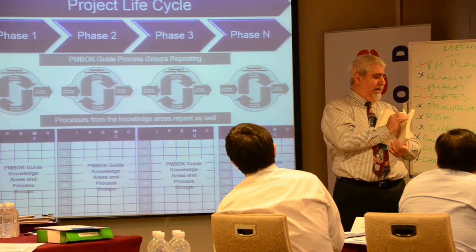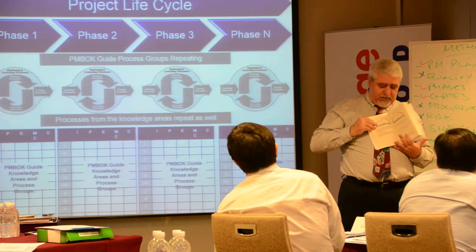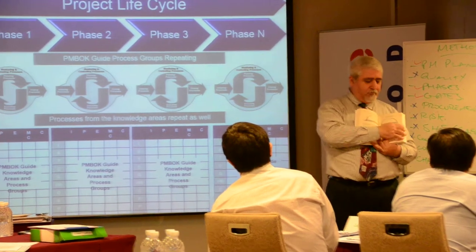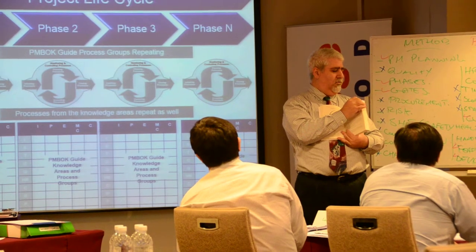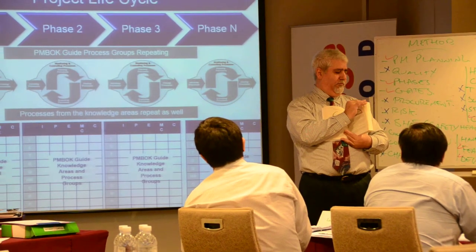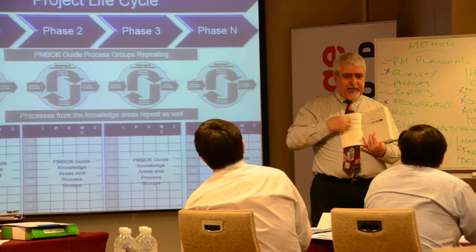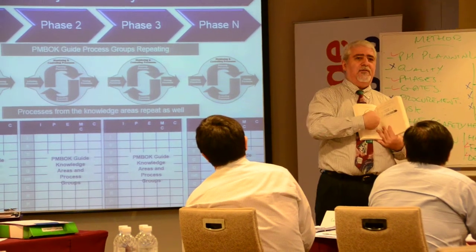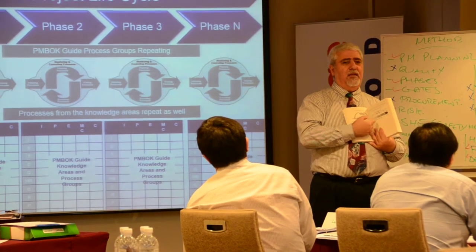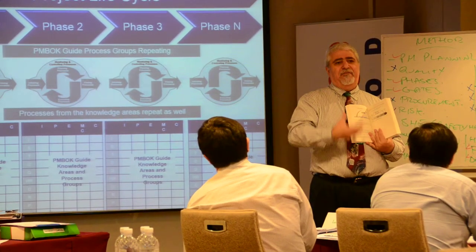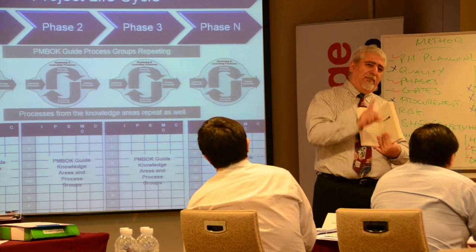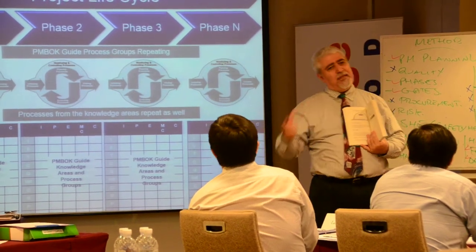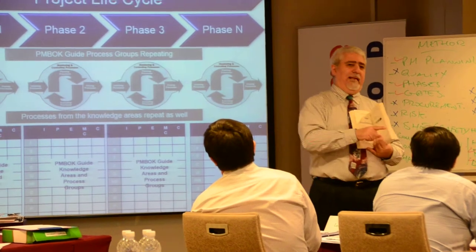If we come back to the next one, the same kind of process repeats in every stage. It shows the kind of repetition that happens in every phase. Every phase you must plan, and there are two plans: the stage management plan and the stage detail plan.